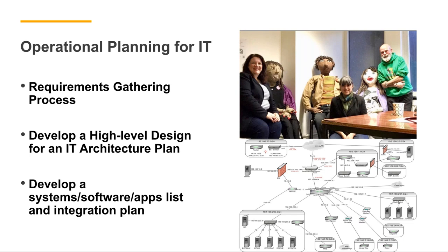We, as a team, interview your facility stakeholders, the people who actually run the science and operational programs, and we translate those needs into technical requirements so that we can make sure we're developing a high-level design for your IT architecture plan, so that from day one, as part of the construction process, you're set up with the right layout for the facility and all the necessary equipment to support all of the scientific and operational needs. From there, you would develop a system, software, and applications list and integration plan.